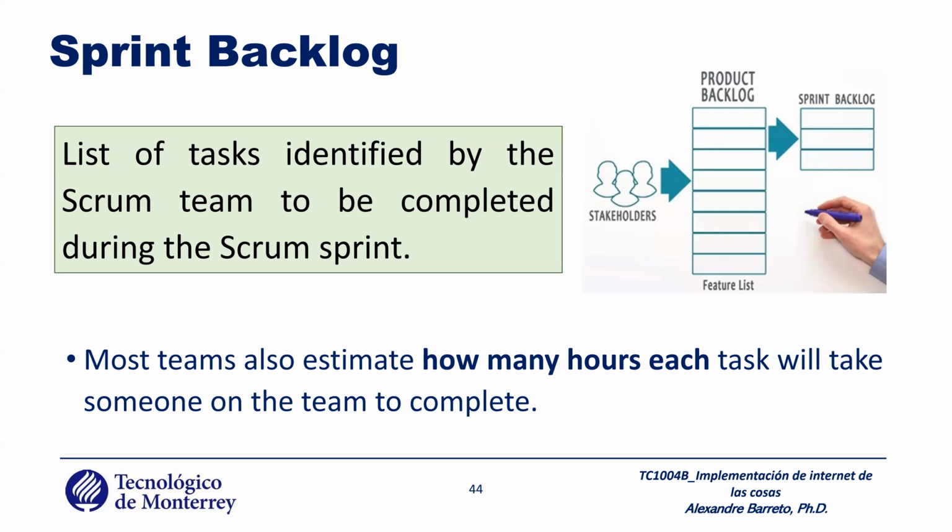Another problem that most of the time user stories have in the beginning in the product backlog is you have a lot of big user stories that you need more than one sprint to work. Again, a good idea is to split the user story into small user stories and use these small user stories to fill the sprint backlog.